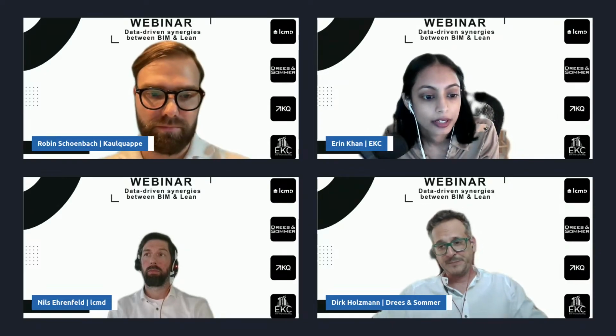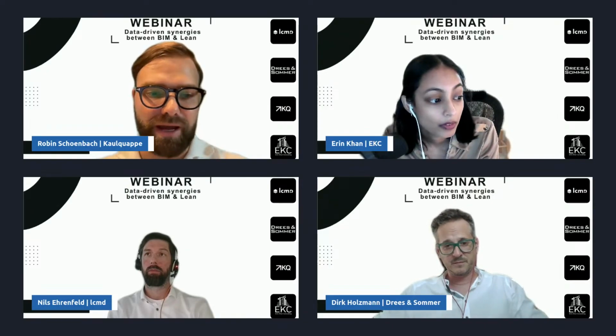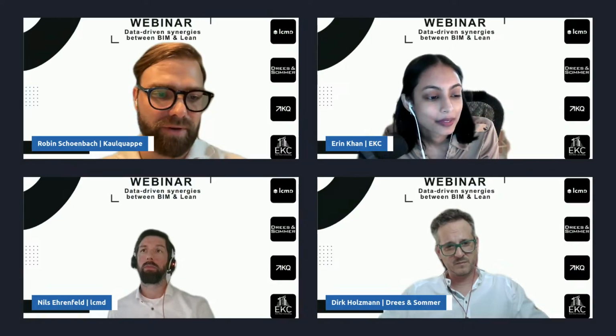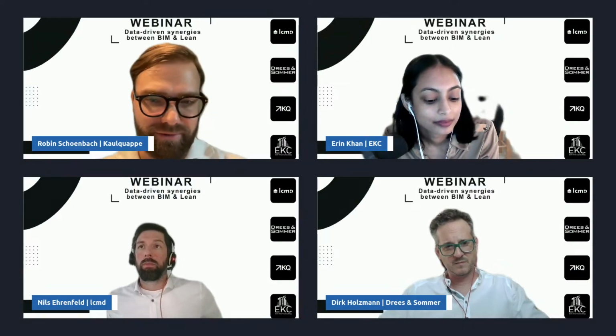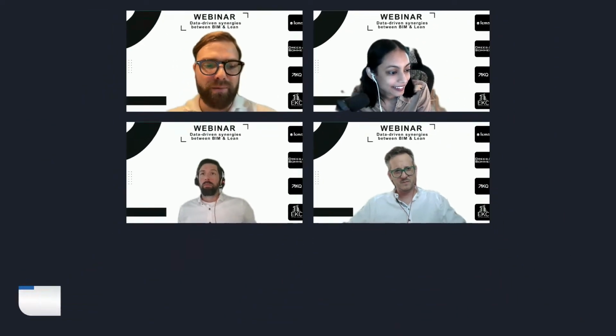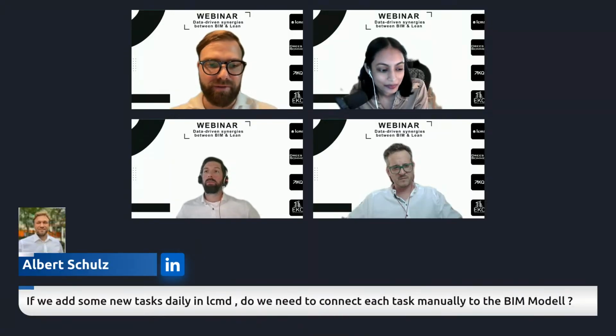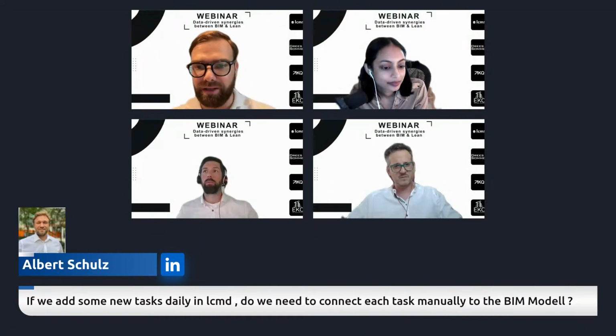Right. And maybe just to answer quickly the question from Albert. Thank you for this question. When we are working with a section model, like a geometrical section model, as Dirk presented in the beginning of the slides, we don't need to connect each task manually to the BIM model, because on the CDE platform BIG we work with geometrical relations.